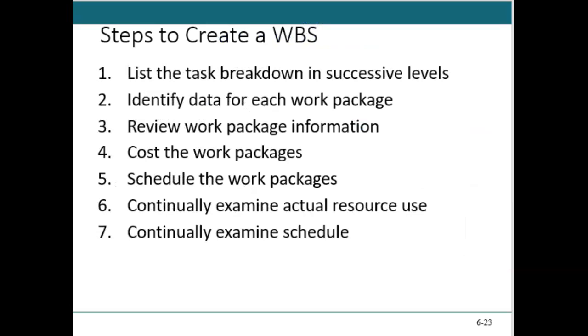So these are steps from the book. They're very similar to build or create a work breakdown structure, right? So I want to break down in successive levels. You saw that in the hierarchy. Identify the data for each work package. That's going to go in a work breakdown structure dictionary. Then I'm going to review the work package information. Always review, right? Plan, do, check, act. That's Deming's cycle.